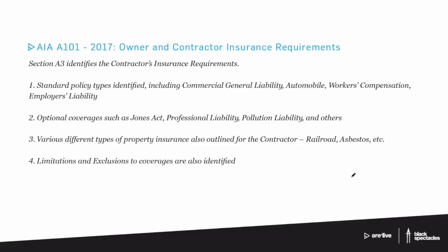So there's your number one, your required commercial general liability, auto, workers' comp, employer's liability, and then there's your optional, Jones Act. Sometimes a contractor actually may bring on a designer. If you're doing curtain walls, that's a specialty field. The contractor or their curtain wall contractor carries their professional liability and things like that.